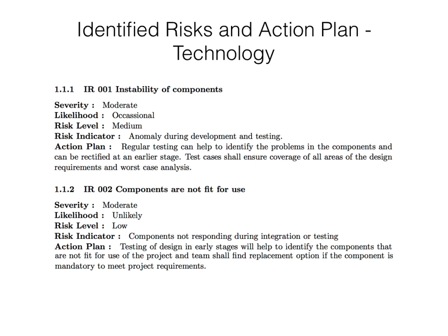That means before integration it was responding very well, but after integration it is not responding. That might mean that the component is not fit for the use of this project. For this case too, testing is our minimization strategy or avoidance strategy for the risk action plan.